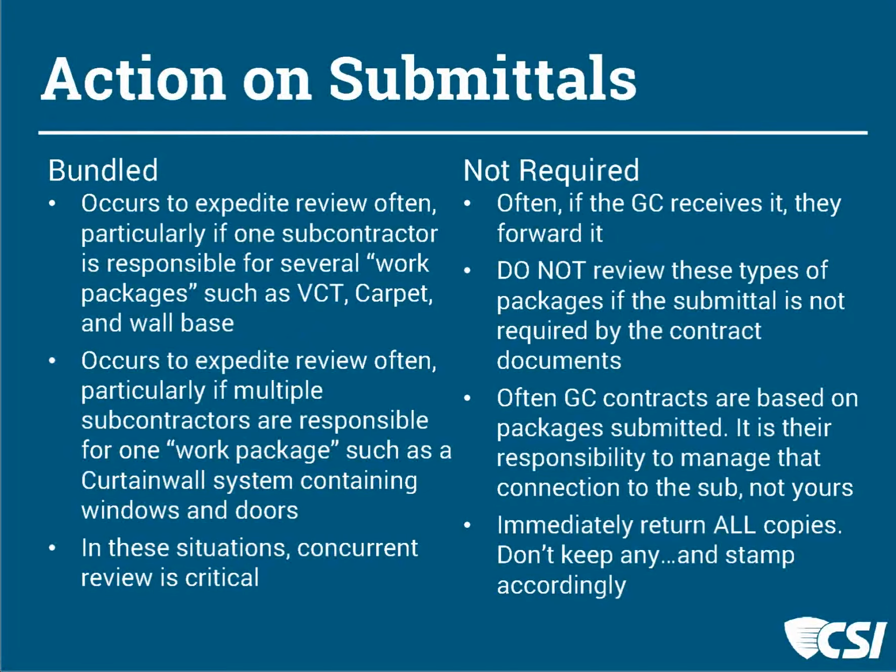Look, we're not picking carpet until we get the wall base and the vinyl tile and the paint and the mini blinds and the door finish, because it's all together. And so we have these work packages, Mr. and Ms. Contractor, that we need to receive from you so that we can look at those together. I know they involve multiple subcontractors, and so it might help them.